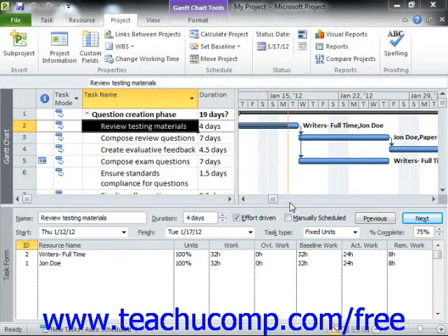If the actual duration matches the scheduled duration, the task is also marked as being 100% complete. In addition to this, if the actual duration is longer than the scheduled duration, Project moves the actual finish date to match the duration you entered.